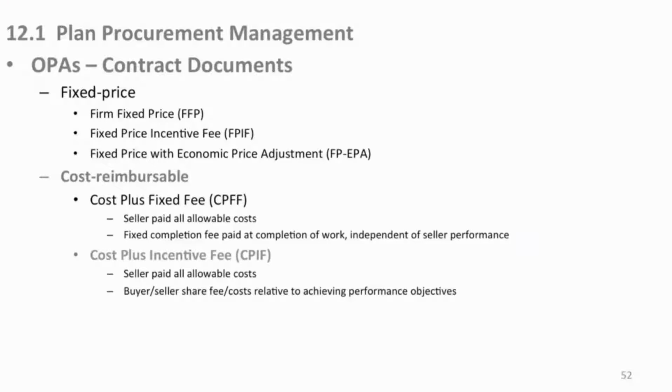Again, these kinds of things are pretty complex, and it's hard to really explain here, but understand that the incentive fee could be a shared fee and cost relationship between us based on performance, as opposed to the cost plus fixed fee, which is independent of my performance. This one is actually based on certain performance objectives, the incentive fee.